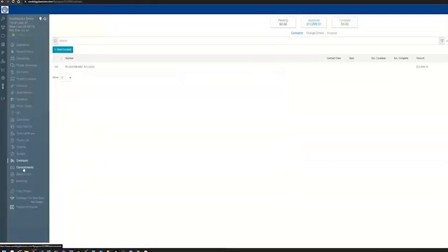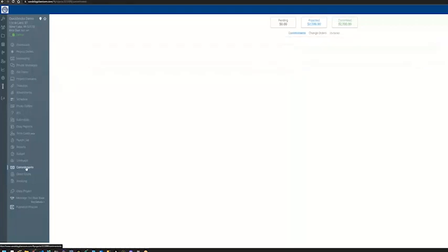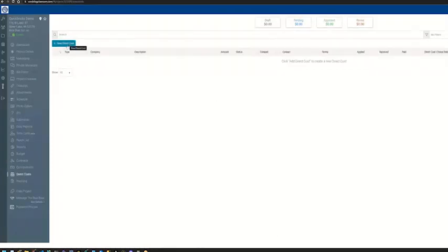So direct costs synchronize to the expenses side. Our goal was to allow users to create direct costs in our system still. So I can create a direct cost. What they'll end up doing most of the time is they're going to create an expense in the QuickBooks system, and they want that cost to then show up in their Pantera system. So the sync to ERP is the same process as the commitment.